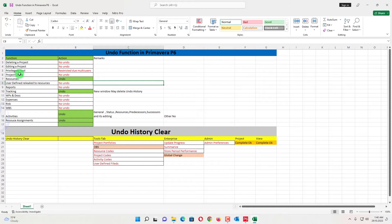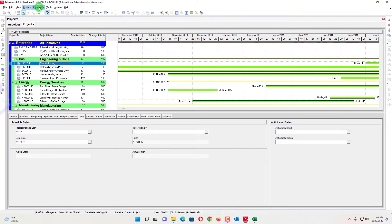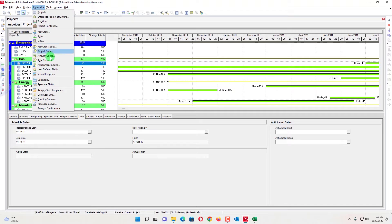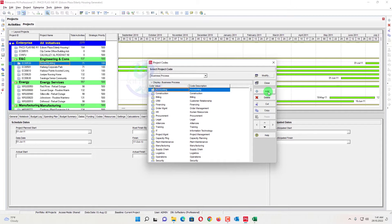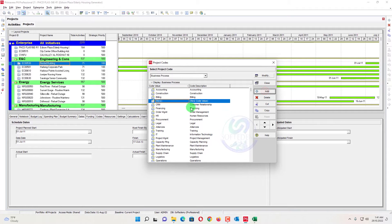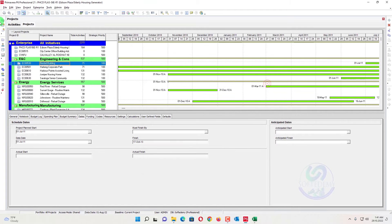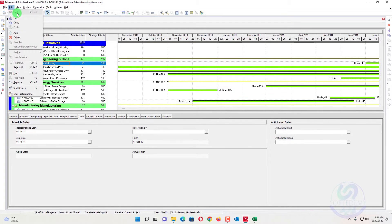At the third place, if you go here to project codes, you will see project codes, resource codes, and activity codes. Here, if you enter a project code, you cannot undo or redo. If you add or delete here, the editing will not work. I will show you — I write this one, and if I close this one, you cannot undo this one. The undo function will not be working here.